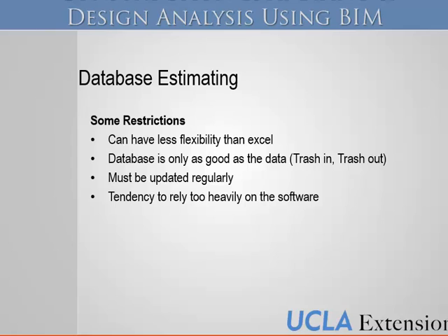I kind of played into those next two. Sometimes you can rely too heavily on, oh, it's in the database, it's good, and you don't think about how this is a different situation. For instance, if you have a drywall partition on the ground floor of a single-story building, with really nice access, no issues, a big site, how is that different than if you were up on the 23rd story of a really narrow high-rise?